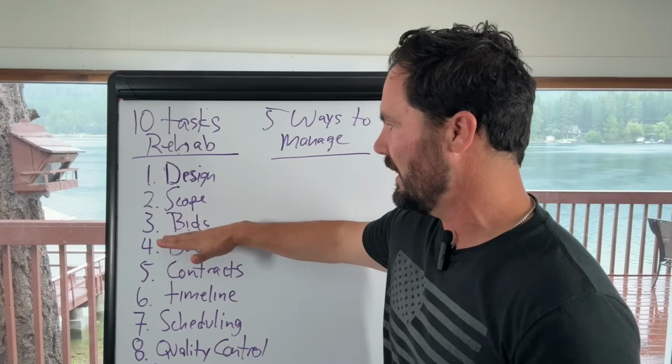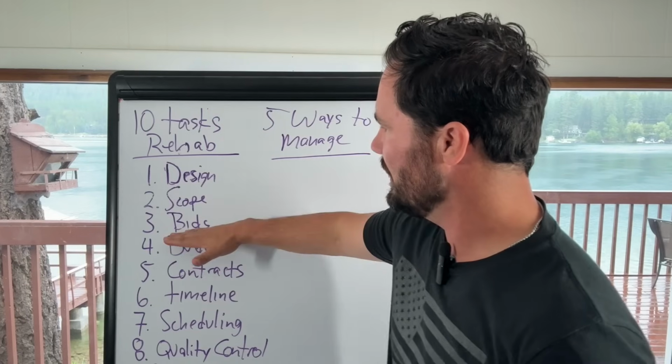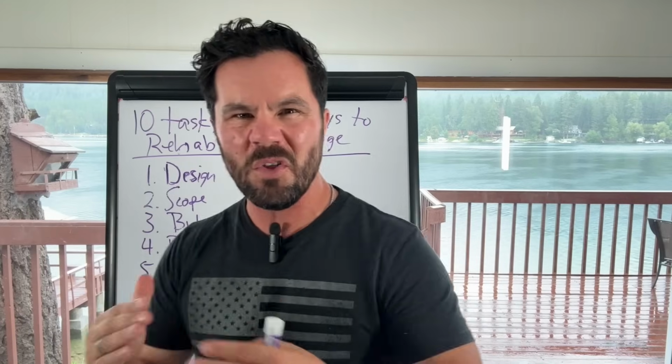So I've got to be thinking that way when it comes time to getting bids. I'm going to spend the upfront time to get bids to make sure that I get the real numbers I want to pay. Okay, so I'm going to get the bids. Then what I've got to do is finalize my budget. Now I know all the numbers on every aspect of my rehab, and so now I can recreate a new budget.